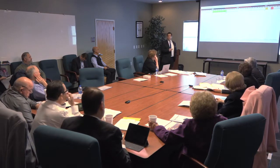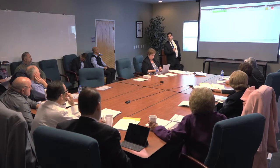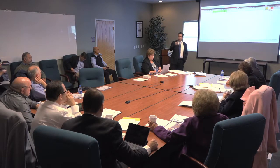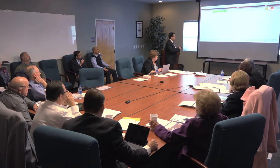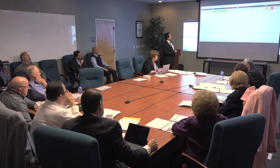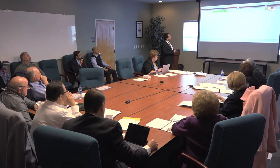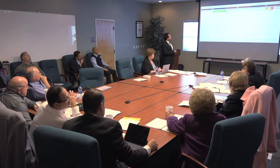Now, I would be remiss if I didn't tell you I am concerned about Rio Grande, just for the sake of seeing where the numbers come out. Right now, they have 45 days that they're calling, if you recall. I've been using this number fairly consistently every meeting, but I want to keep reminding you that's the number out there. That excludes some weather days they haven't filled up yet, but we don't have confirmation on those. Right now it looks like substantial completion is going to hit in early August. But then if you take 45 days for occupancy, you're already getting into September. So it's going to be very, very tight.